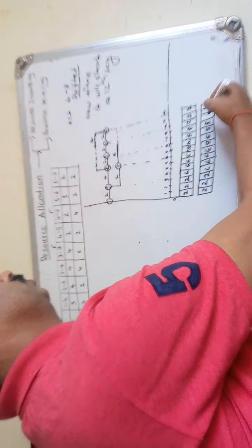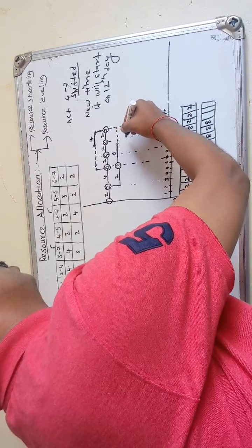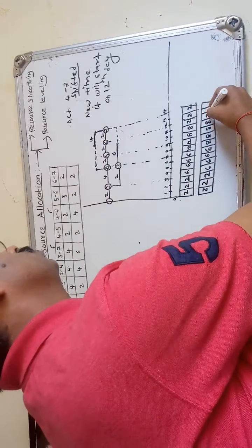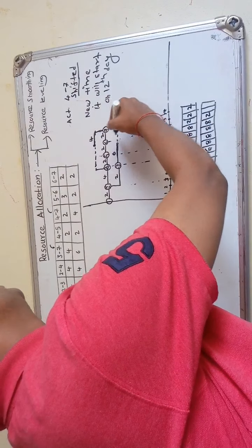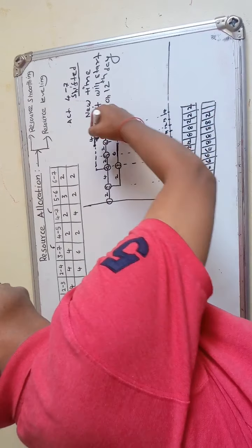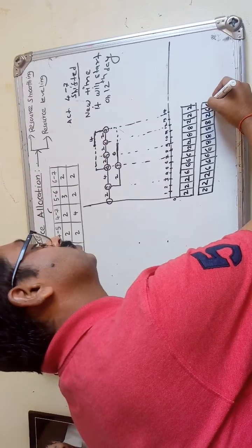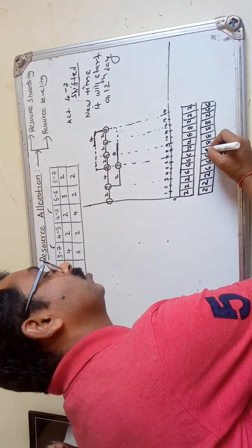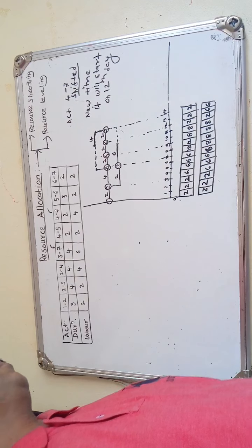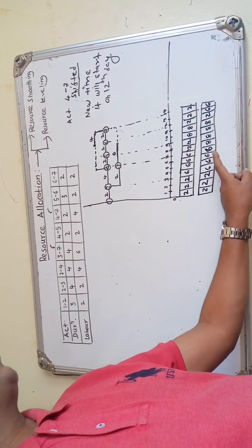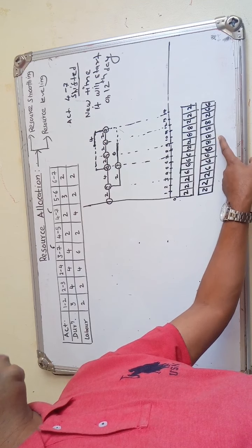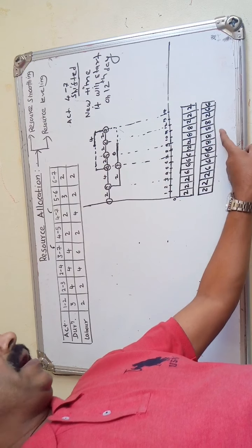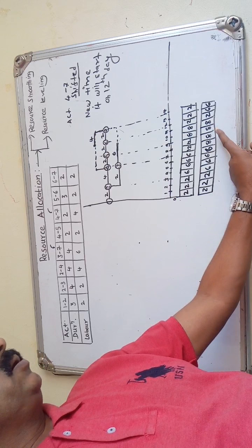On the 12th we have 2, and on the 13th and 14th, 4 plus 2, 6 and 6. So like that we have changed the activity start time, and maximum labor required after smoothing we got 8. So the maximum labor employed after smoothing is only 8. Before smoothing it was 12.